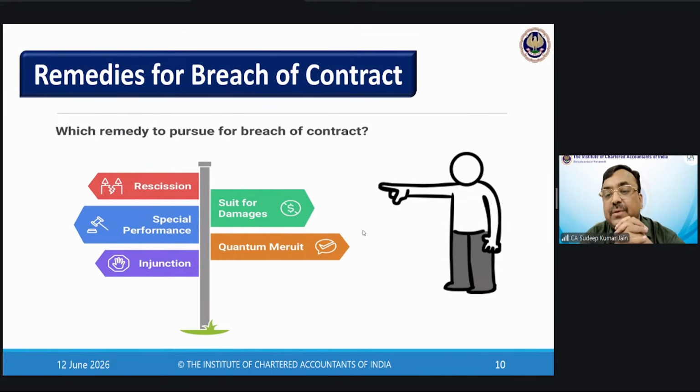If X's supplier is the reason he could not deliver, sir, you forgot the exceptions. Third party performance is not any excuse for X in the contract between X and Y. Even then he has to make the compensation. Okay, Sandeep, clear?